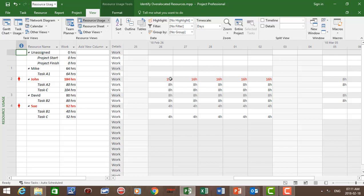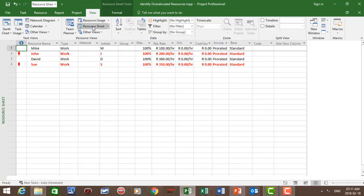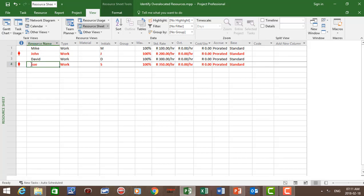Our next view is the resource sheet. In the resource sheet we can see John and Sue are over-allocated.